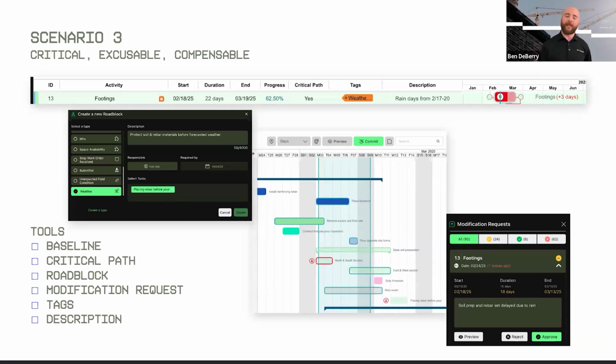But just know that within your look ahead page, up in the top left corner, there is a roadblocks log button. You can click on that and see a list of all of your roadblocks. Then within that status column, you simply update them to removed. That will clear the roadblock from your look ahead. Those do not prevent you from doing anything. It is just a documentation piece. The main purpose of why we built that tool is you can capture stuff that's happening right in front of you, but it's really much more effective if you're using it in a proactive sense.